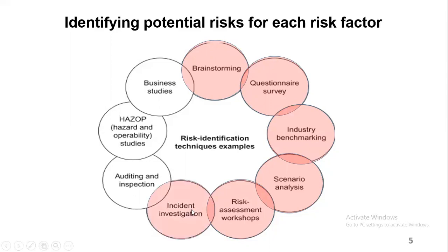Okay, then there's incident investigation. I think that one, it's an investigation, so that's where you want to understand the root cause. You can actually read from there also. If in the past you have worked on a similar project and there was an incident, you can read on that incident investigation, and it will give you some hints on specific risks that you should be aware of.